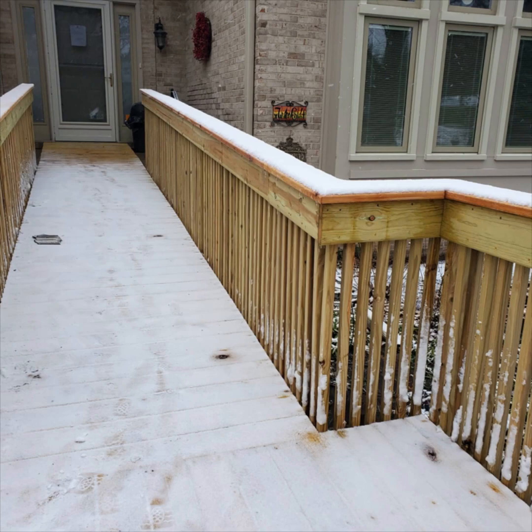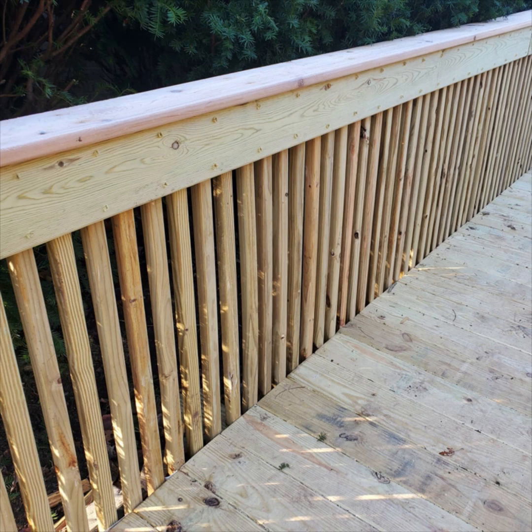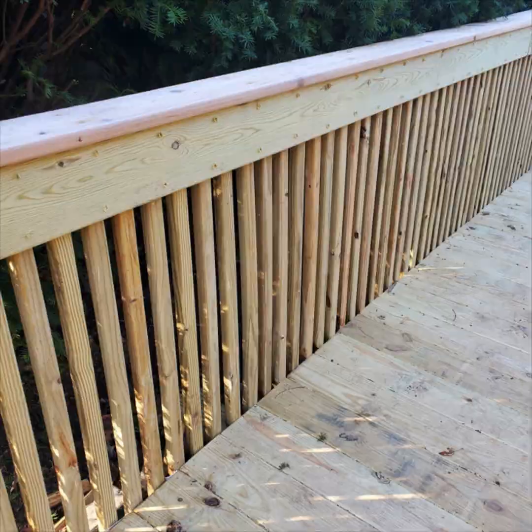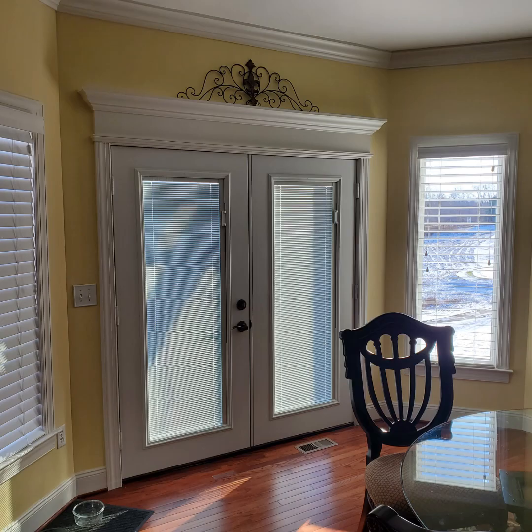All right, this ramp, I'll say it was about $22,000 for a 70 linear foot wheelchair ramp. Materials were pretty high. This was late in December or November of last year. And obviously you can see we have a bunch of spindles supporting the handrail, and we had a cedar top plate. That's pretty much what made it. We had 2x8s supporting the ramp going all the way down.